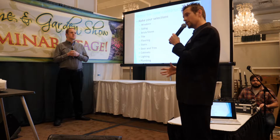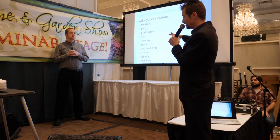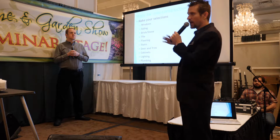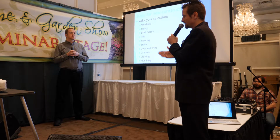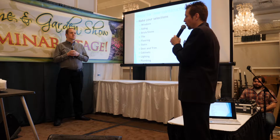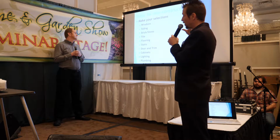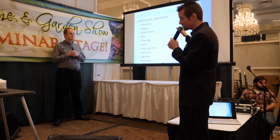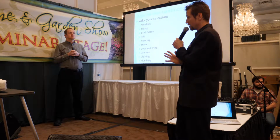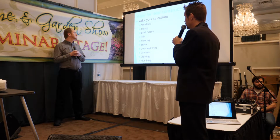Because otherwise, what we see time and time again is that once things change during the process and the house is at a certain level of construction, it's not as easy to change out something once it's ordered or if it wasn't done at the right time. So that is why, to me, it is vitally important to have as many selections chosen before construction ever begins. And that's from windows to siding.